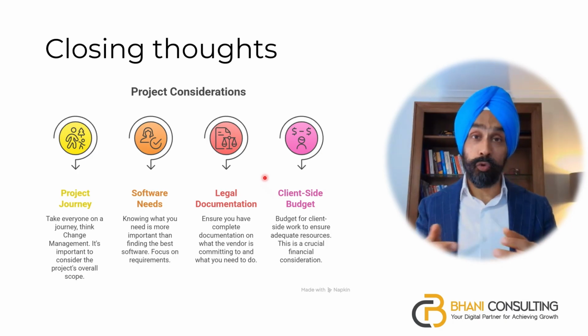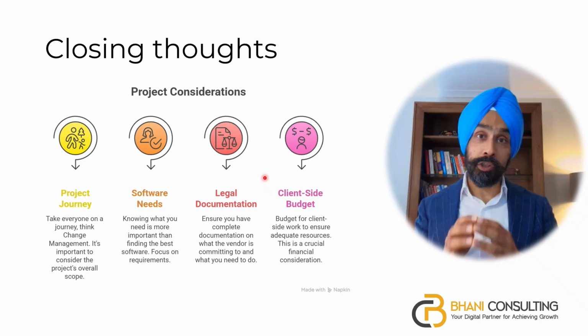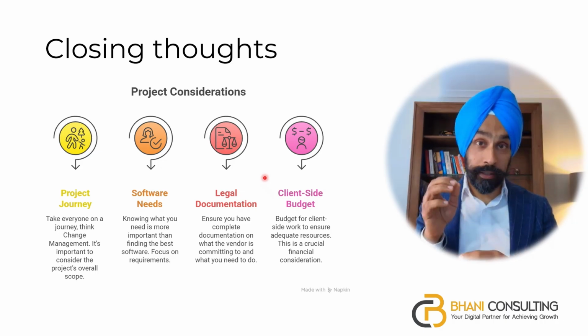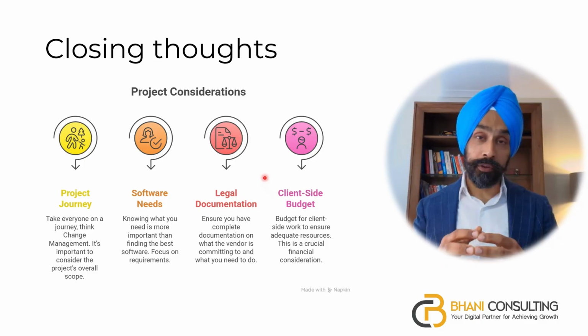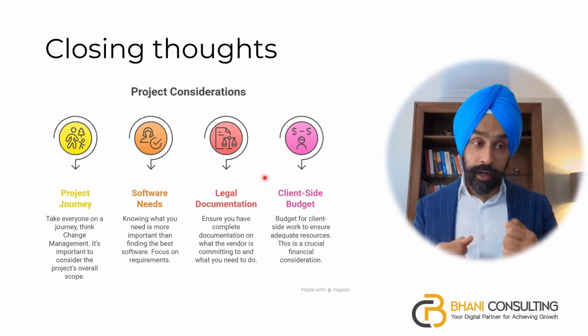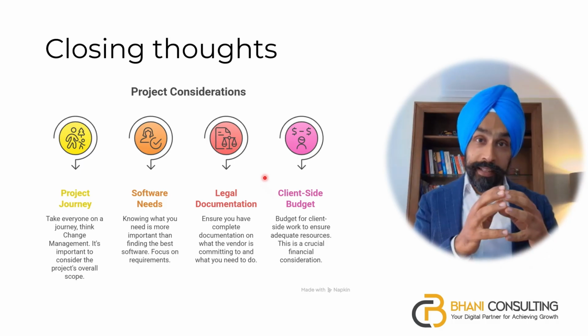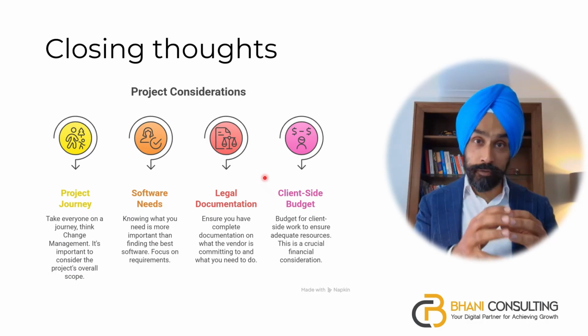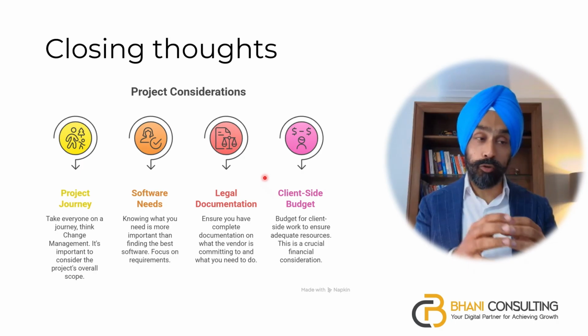So what resources do we need, and budget those resources that are required by you as a part of the project. So when it comes to the estimate of the project, you include the licenses and the cost of licenses to procure the software.